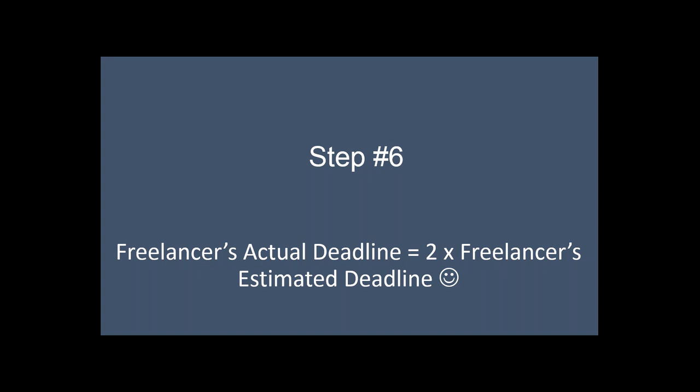If you have a full-time employee, again I would say consider 1.5 times the estimated deadline, because I have this observation from my experience that it happens. In fact, while I was developing Zapdeals, my developers told me that it will take 1 month, but it dragged on, and there were some issues when we started development, and eventually the project took more than 2 months to finish.